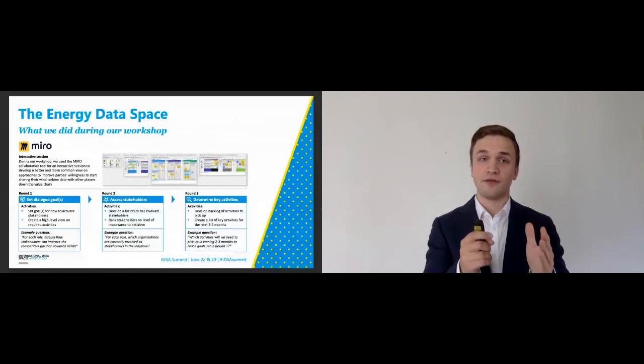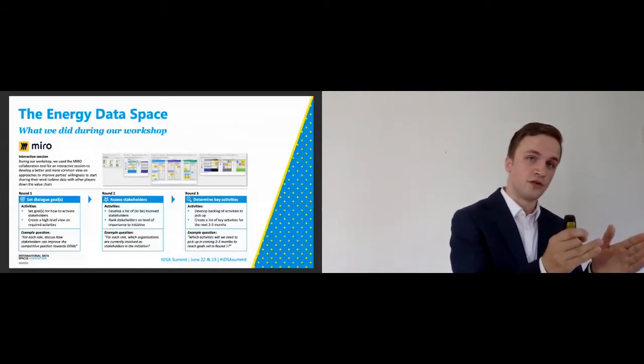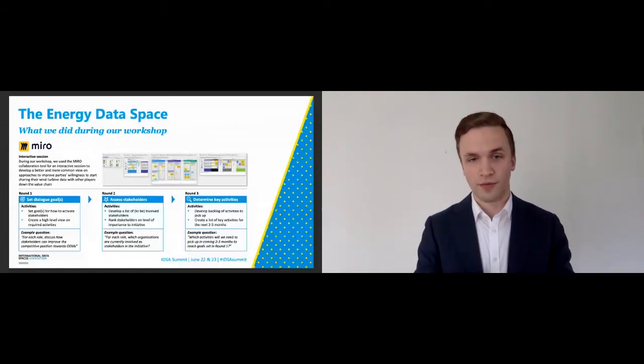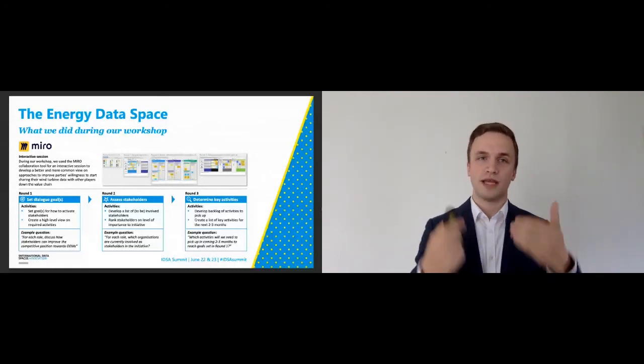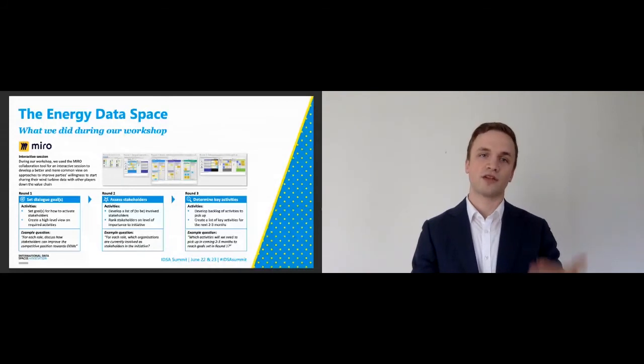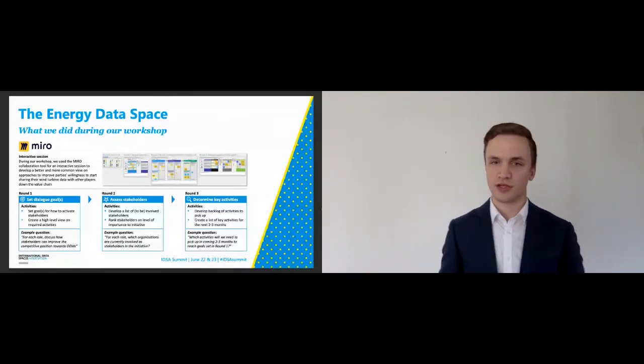In the second round, we knew what we wanted to do, and now we determine with whom we want to do that. So we assess together with all stakeholders what list of stakeholders we still need to involve, and also rank them on level of importance to the initiative.